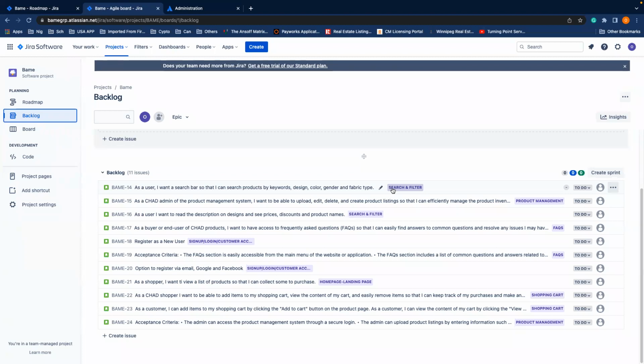Under this backlog, there's something called prioritization. Depending on who the product owner is, or even you as a BA, depending on what function you're delivering on your team, you would now prioritize. Based on what we discussed on our roadmap, these are the things of priority that we need to deliver on in the upcoming sprints. You prioritize them and make sure the ones that you prioritize are at the top of this table.